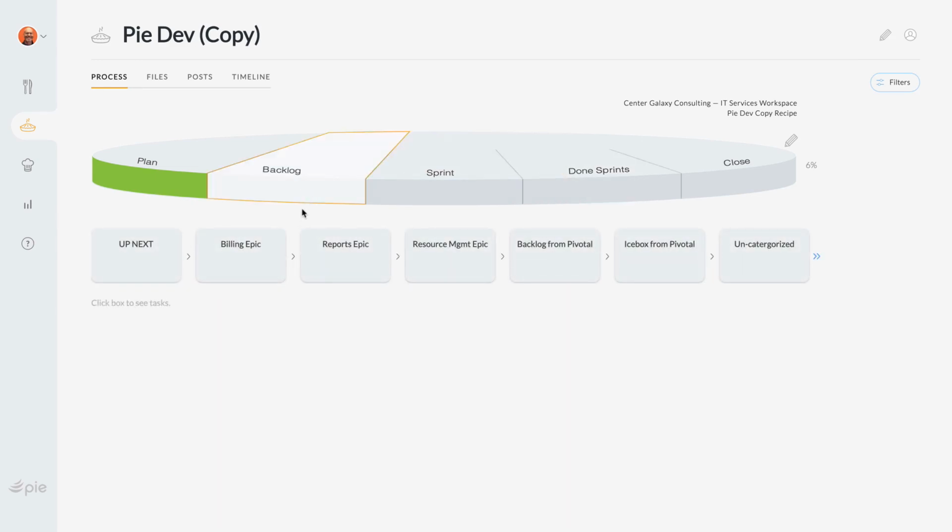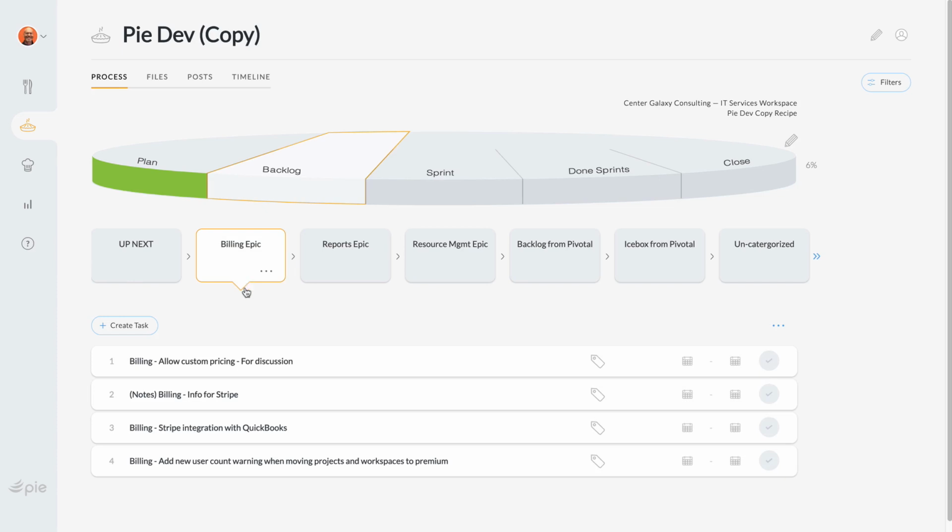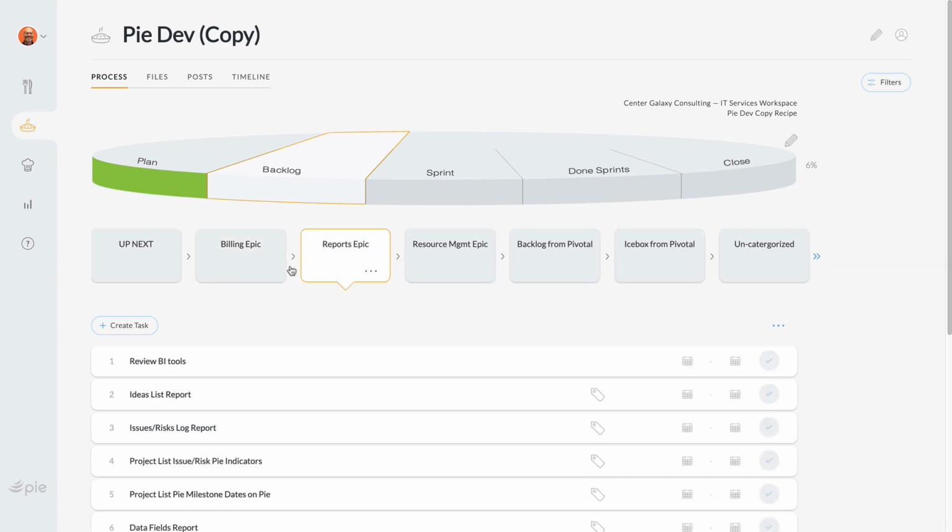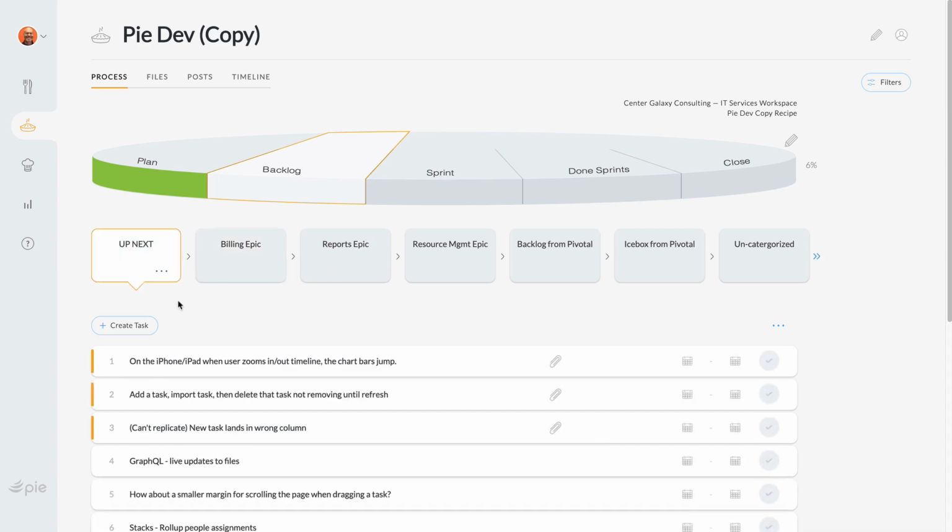of the project. The way I've set up my backlog is I used what we call process boxes to contain boxes of stories, tickets, requirements, whatever you want to call them. We call them tickets. And it could contain bug defects or stories for new features, requirements. And I've categorized them based on major parts of the project: reporting, billing, features. And then we have the up next here.